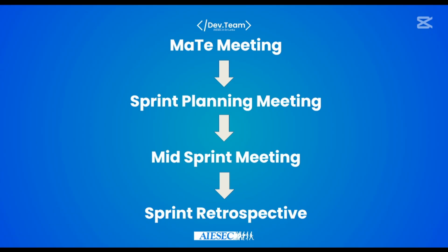So the sprint planning meeting should take place in the weekend before a sprint starts. So if a new sprint starts on Monday, you have to take this meeting on Saturday or Sunday, right? Now we are in our first sprint, and in the first sprint we are not following this formal procedure. This is the first week of the first sprint, and from Monday we are starting the second week of the sprint.